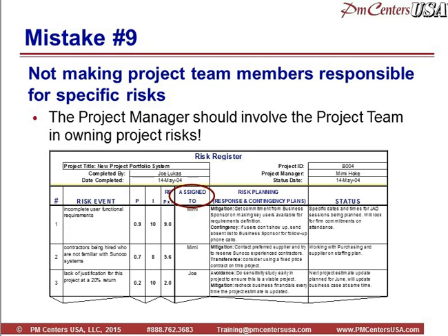And you'll notice what I'm showing here, and that is a status column. This is a template that I like to use. It's pretty simple, pretty nice, because, again, we want to make sure we're looking at risk at each project team meeting: what's happening, what steps are you taking to deal with this risk as far as risk responses. And you'll notice right here we have listed the mitigation plans, contingency. Here's an avoidance down here. Here's a mitigation plan again. So the 3 examples I'm showing here are all threats, not opportunities. But again, the point being, you list the risk events, the plans for dealing with them, and the status of those plans. And then the other thing, too, is this. These values will change as you take actions. They're not static. They are dynamic values. So you ought to be looking at those and asking the question, is the risk exposure on this project going down?